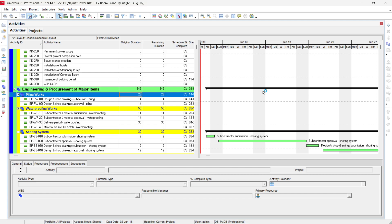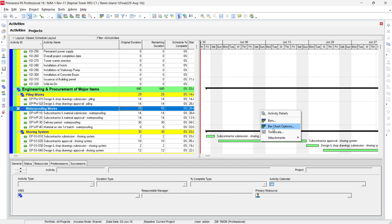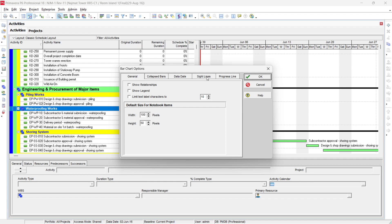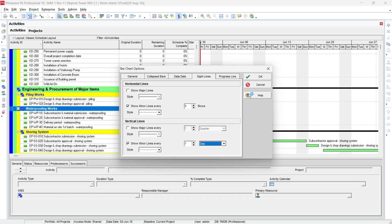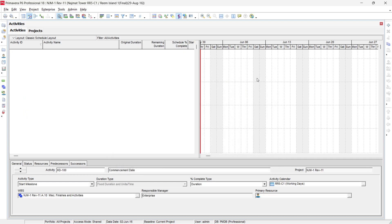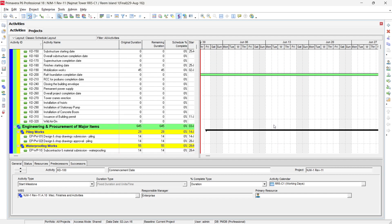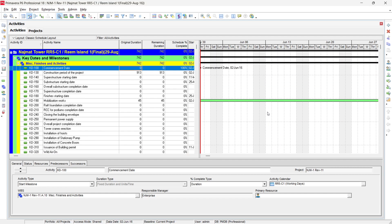If you also want the individual days to be marked with lines, right-click in the Gantt chart and go to Bar Chart Options. In Bar Chart Options there is a Sight Lines section. Select Sight Lines and under the minor lines option, choose to show minor lines at every day. Selecting Day will show vertical lines for each day.